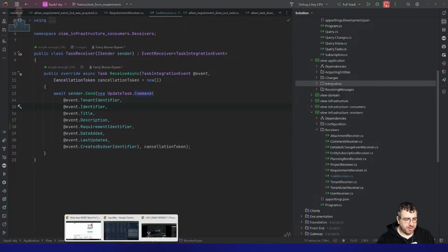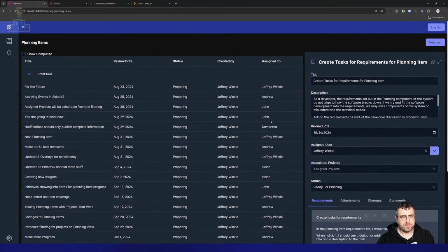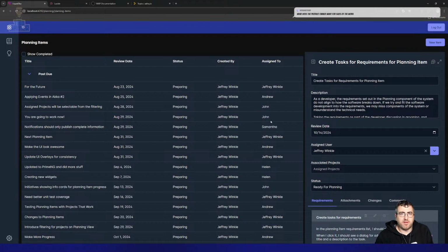So t-shirt sizing, where do you t-shirt size, right? So t-shirt sizing doesn't belong in tasks. It's not a dev task concern because the t-shirt sizing comes before we've even planned the work out. The t-shirt sizing is, I think it's this big. If we're going for actual small, medium, large, etc. I've seen it done where we give kind of large point ranges, where we say, oh, okay, that's a 30, that's a 50, that's an 80, that's a 100 or whatever, right?